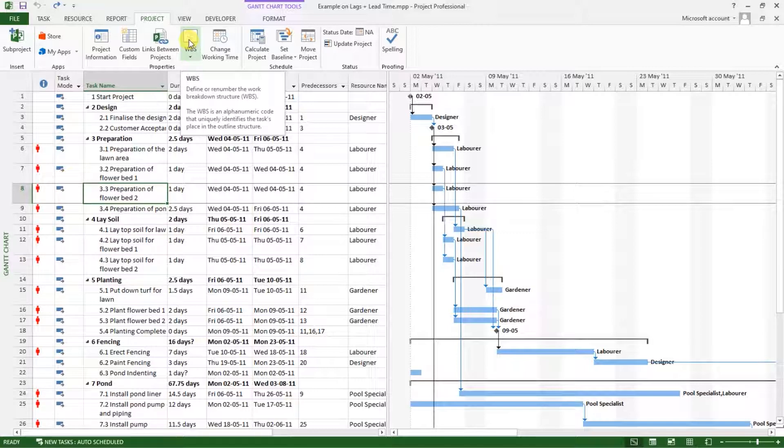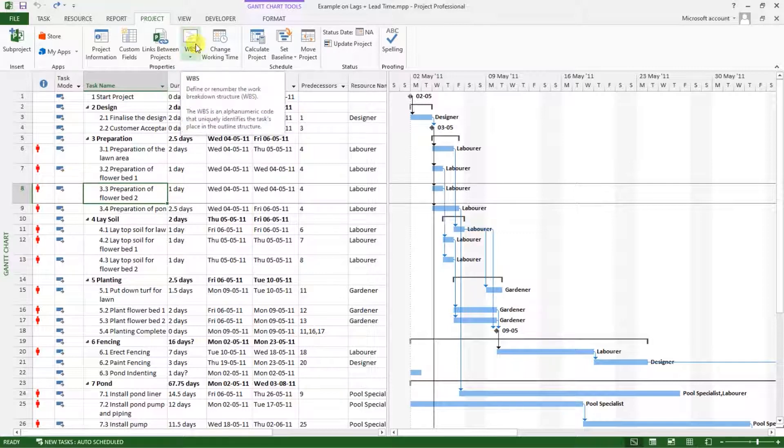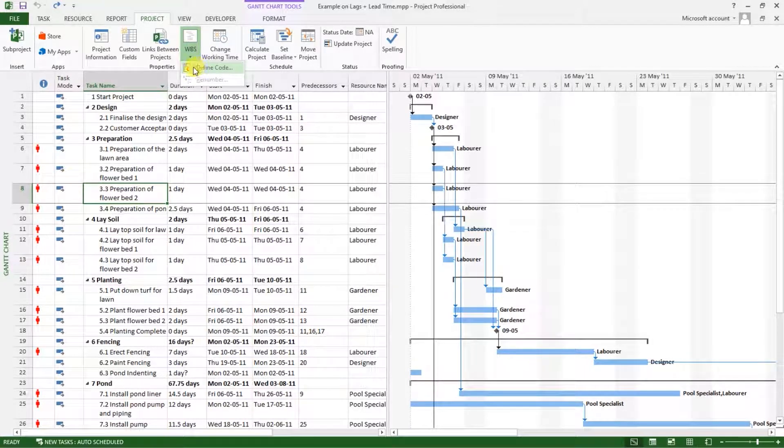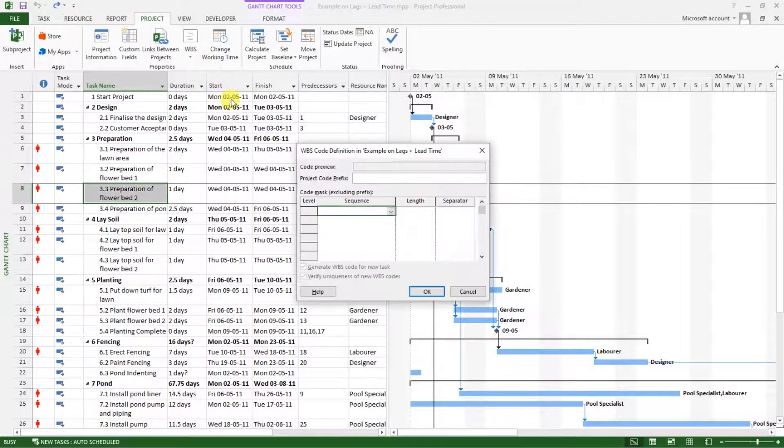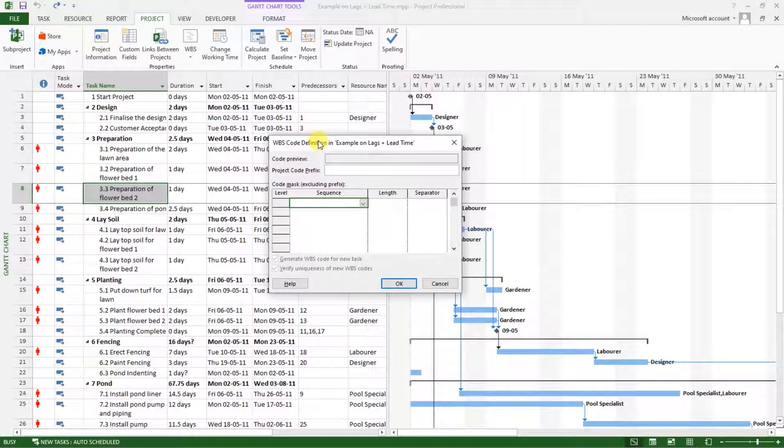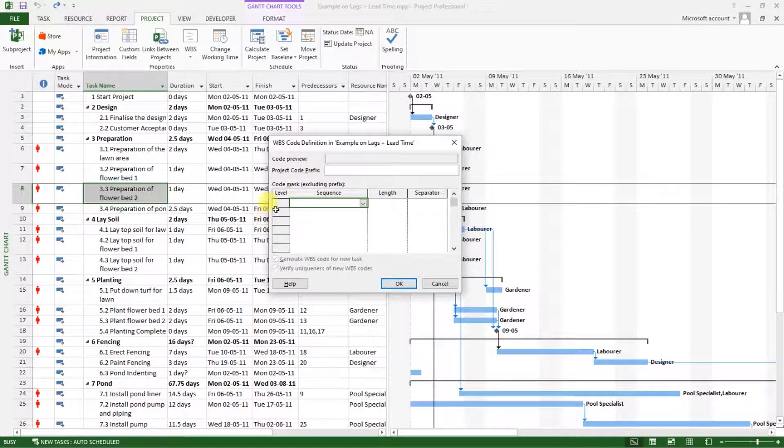The WBS is an alphanumeric code that uniquely identifies the tags placed in this outline structure. So click on that, you will see an alphanumeric code. Click on that, then there will be this popup that opens.